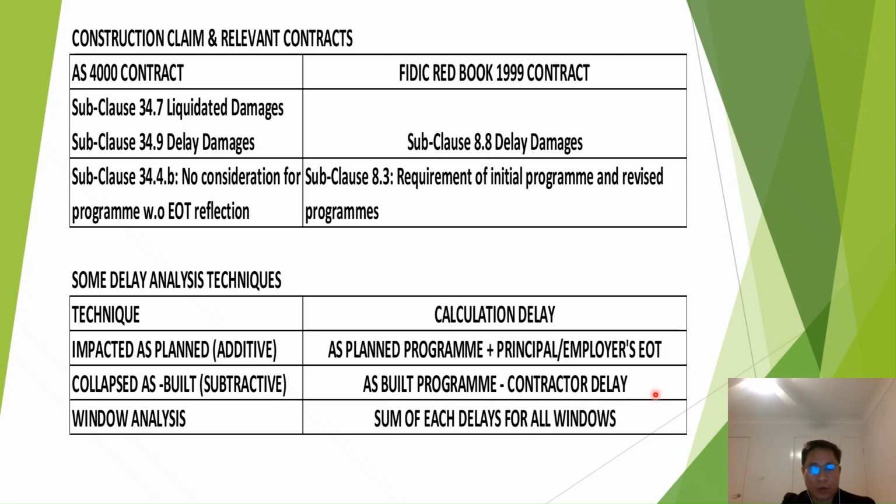So the completion date will be based on the as-built program minus the contractor delay. That is, if the contractor delay is not involved in the program, we will be able to calculate the delay for a construction project. That's why we call it subtractive.